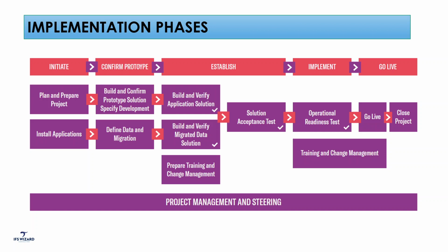We go through all that during the establish solution phase, and we verify the basic data and the roles. In this particular phase, we also do the test runs for migration. Once you have the solution specified, we get the sample data from the customer and do the migration into our migration environment.